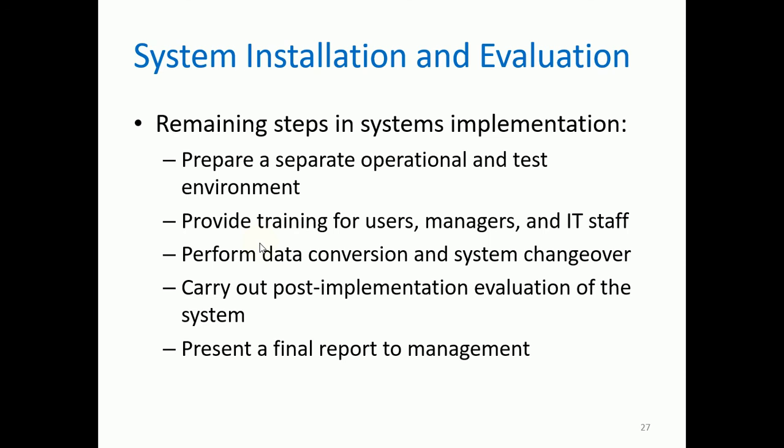So next we have system installation and evaluation. The remaining steps in systems implementation are to prepare a separate operational and test environment. It's not yet the final deployment, but you have to test it using the actual computers or the actual hardware infrastructure available in the organization. Another step is to provide training for users, managers, and IT staff. Then we also perform data conversion and system changeover, carry out post-implementation evaluation of the system if the installation is a success, and then present a final report to management.